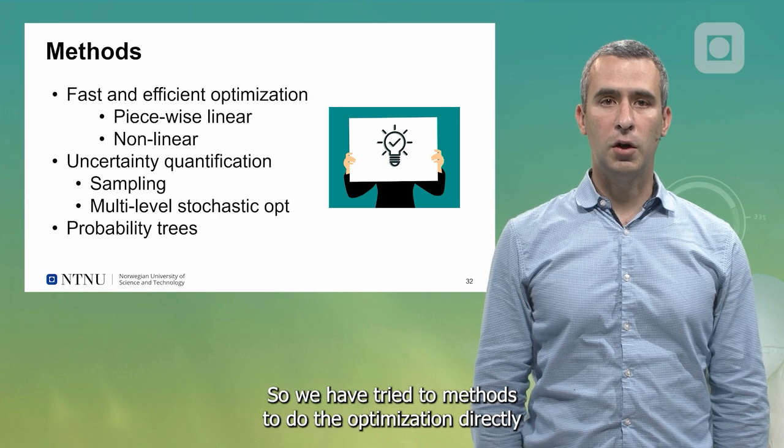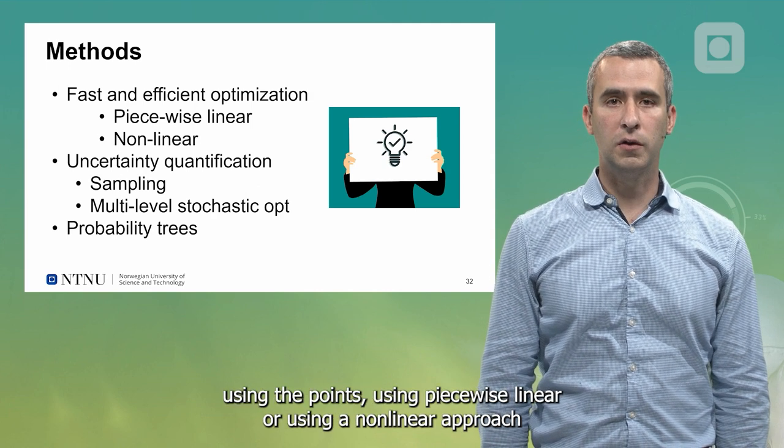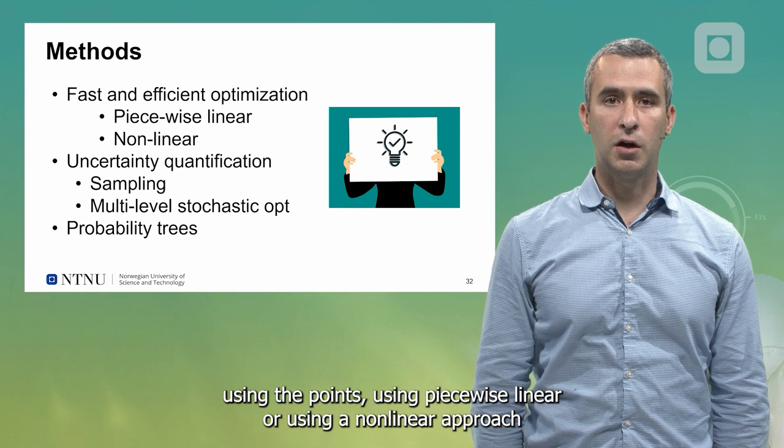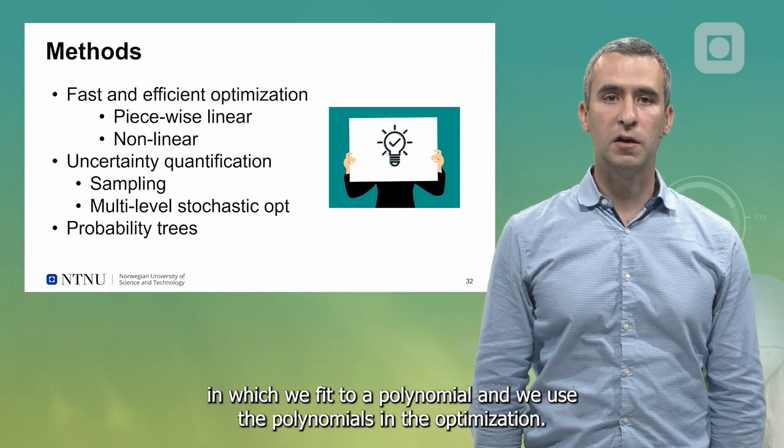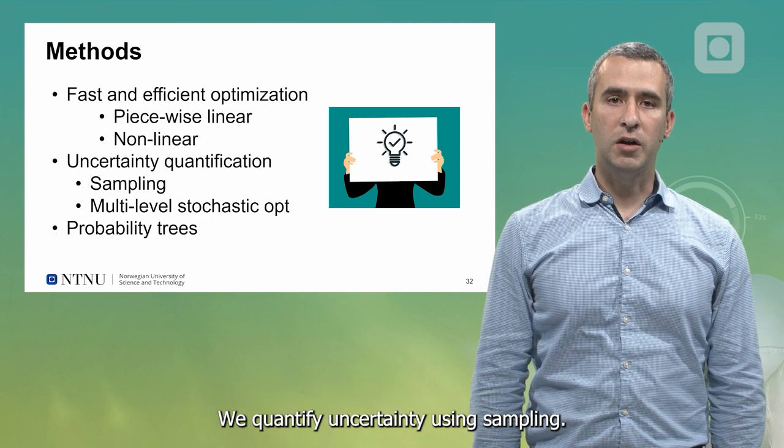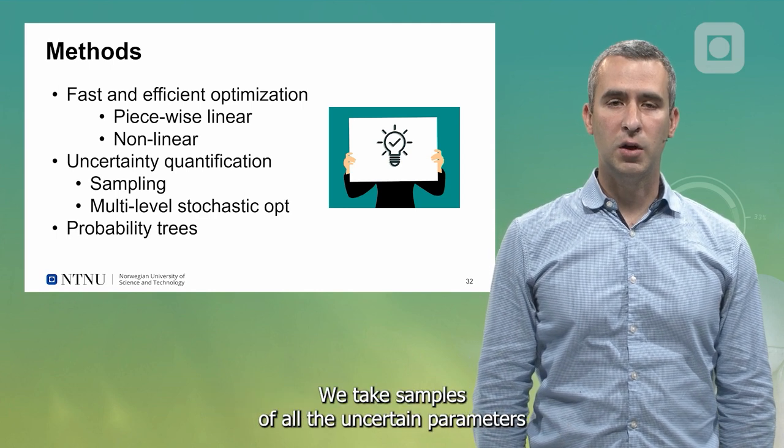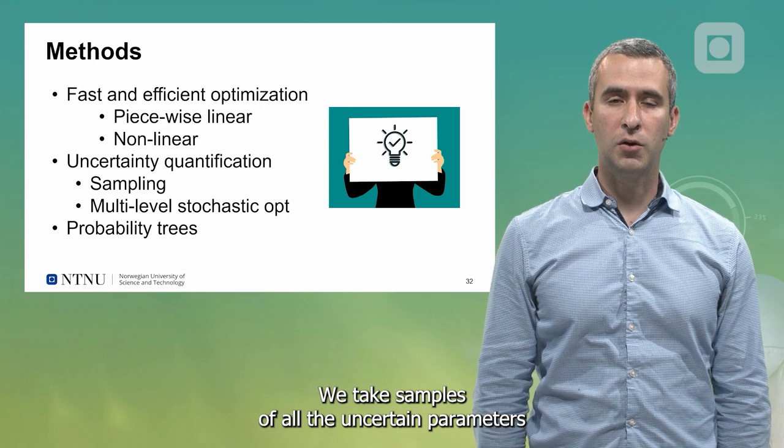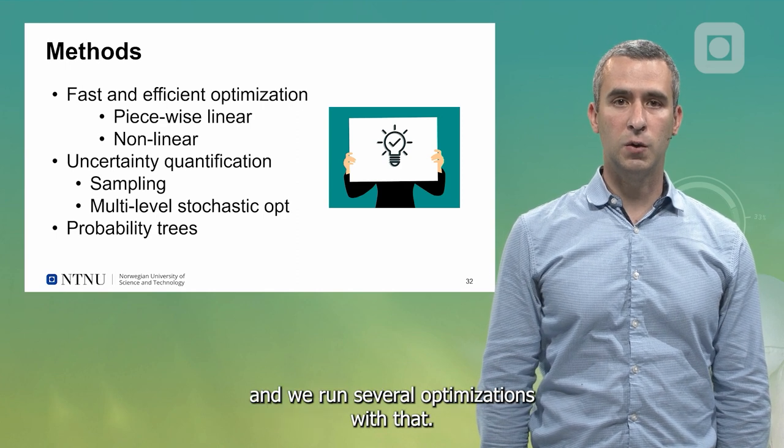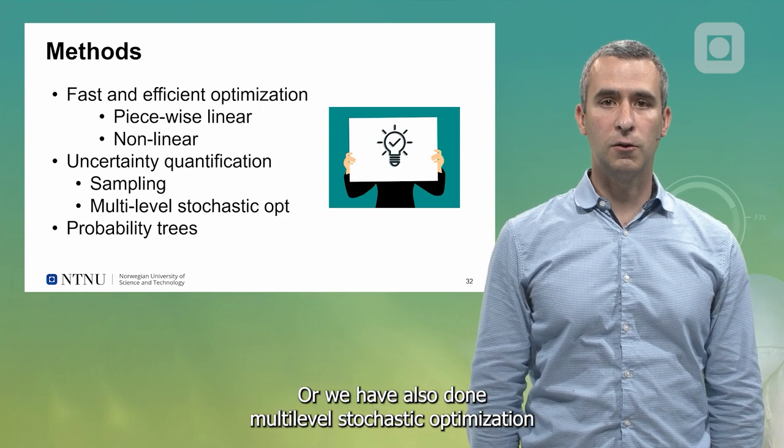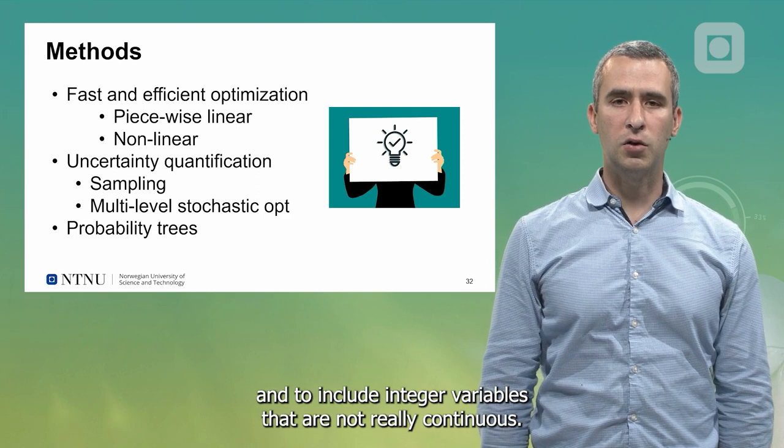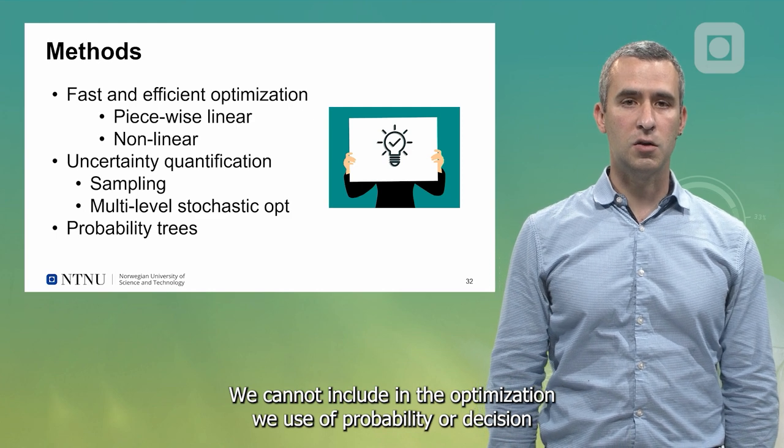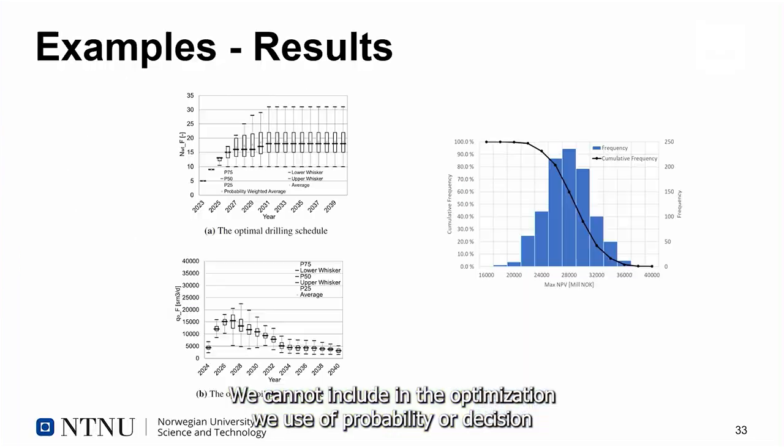We have tried two methods to do the optimization, directly using the points with piecewise linear, or using a non-linear approach in which we fit to a polynomial and use the polynomials in the optimization. We quantify uncertainty using sampling. We take samples of all the uncertain parameters and run several optimizations with that. Or we have also done multi-level stochastic optimization. To include integer variables that are not really continuous, we use probability or decision trees.